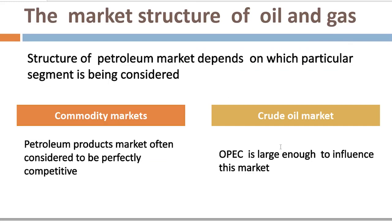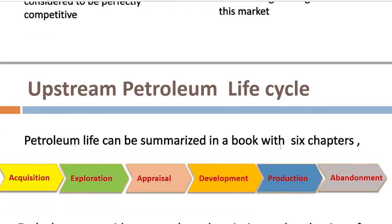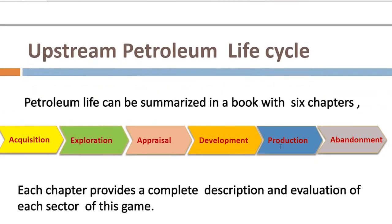Now we will discuss the upstream petroleum life cycle. Our projects are divided mainly into six phases: acquisition, exploration, appraisal, development, production, and abandonment. Each phase provides a complete description and evaluation of each stage. Our industry is a gamble between the government and oil and gas companies, and we need to understand the structure to win.